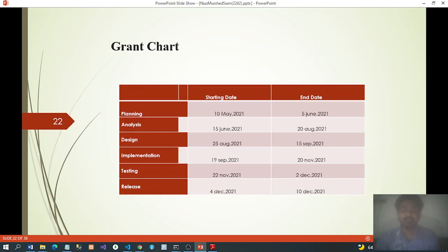Gantt chart showing project timeline: Planning — start 10 May, end 5 June. Analysis — start 50 June, end 20 August. Design — start 25 August, end 15 September. Implementation — start 20 September, end 20 November. Testing — start 22 November, end 2 December. Release — start 4 December, end 10 December.